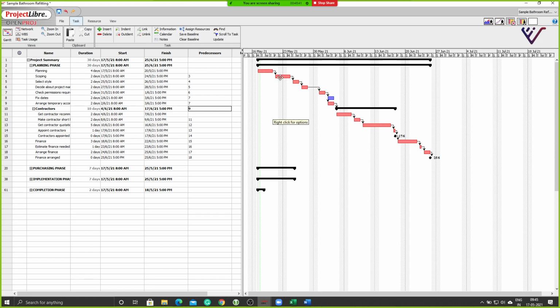visually. That means I can select this, I can just click on that activity, I can drag and make sure that it connects to this, or I can click on this and I can connect to this, or here to this activity. So you see there's a connection getting created between those and it is automatically getting reflected in your predecessors here. Yeah? So there are 2 ways of adding predecessors.